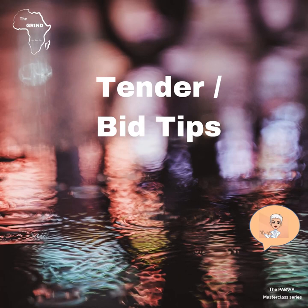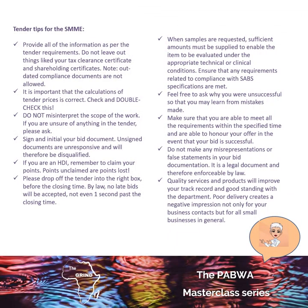Tender bid tips. Provide all information as per the tender requirements — I've said that over and over again. If they ask you to do something in a specific way and you do not do it that way, it's most likely you will be disqualified. Make sure all your calculations for your pricing are correct — check, check, and double check. Try not to misinterpret the scope of work. If you are unsure about anything, please ask. That's why the clarification period is so important. If there are elements in the scope that are not clear, you have the opportunity to ask those questions and clarify anything in that document.